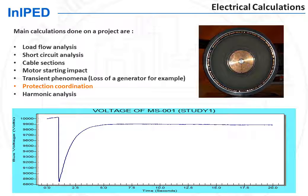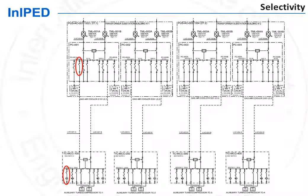Another important calculation required for commissioning is the Protection Coordination Study. It defines the settings of protections in order to ensure selectivity. Selectivity means that the protection of individual consumers will operate first before any higher-level protection. For instance, if there is a short circuit in a particular pump, the protection of that pump only will operate, and not the protection of the higher level of the electrical distribution system. Therefore, the power supply will be cut only for this particular pump and not for other consumers.